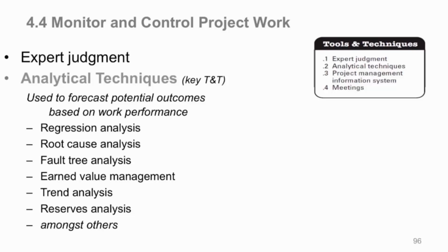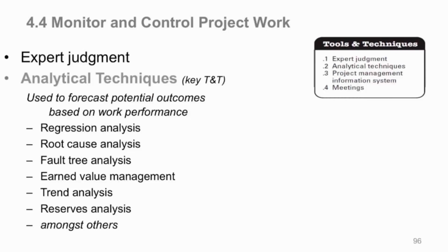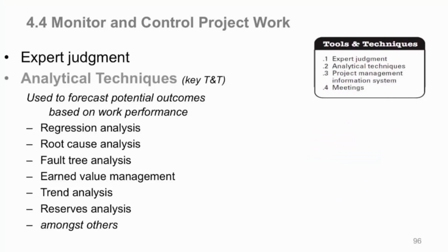Earned value management is primarily a cost analytical technique, but that's how you forecast your costing. Are you going to be on budget in 8 months from now? Trending analysis, same kind of thing. Are you trending up or down with the number of defects, number of change controls, or whatever it is? Reserves analysis is another one, because as we're going to see later, we're going to want to put money aside in the budget for things that we think may happen, and if they do, we're going to want to fund them to fix them, but if they don't happen, then we can release that money. And there's more to it than that, but part of the analytical techniques is to do that as you're controlling your project. And there are other things too, but these are the key ones. So you have a lot of analytical techniques at your disposal that you can use as you monitor and control your project.